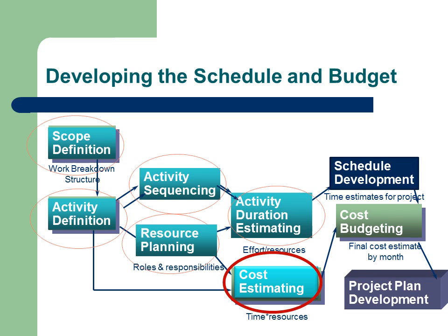At the same time, you can build up a cost estimate for your project. Usually the main project costs are for human resources. That is, multiply the cost of the resource by the amount of time required. Other costs, such as equipment, material, travel, etc., are then added on.